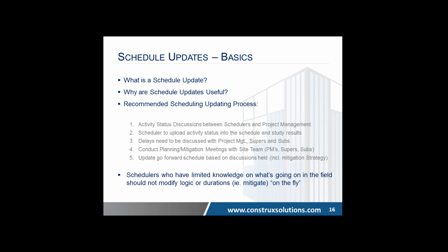So you either do one of two things. You get more people there, you figure out what's happening to cause this problem, and you fix it, or you adjust your schedule going forward to give you an accurate accounting of probably what's going to happen, because that will allow you to ultimately see the real critical path.